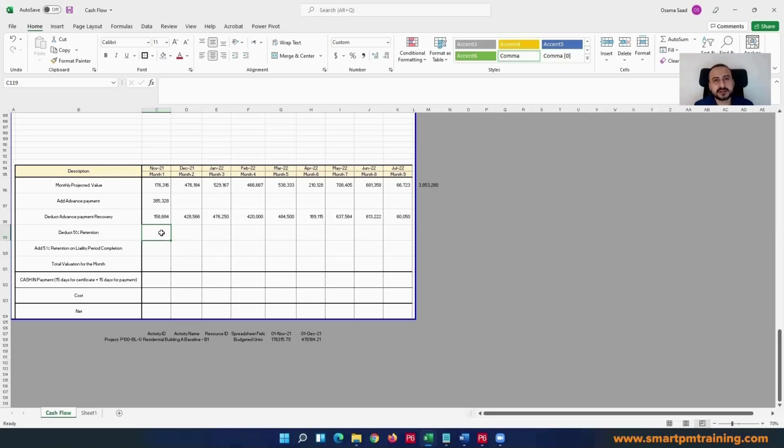But if there is any maintenance, they will force him to rectify any defects. He will be accountable until he completes the liability period. Sometimes it's 1 year, sometimes 2 years. It really doesn't matter. But in our case, let's assume that it's 1 year from the project completion.